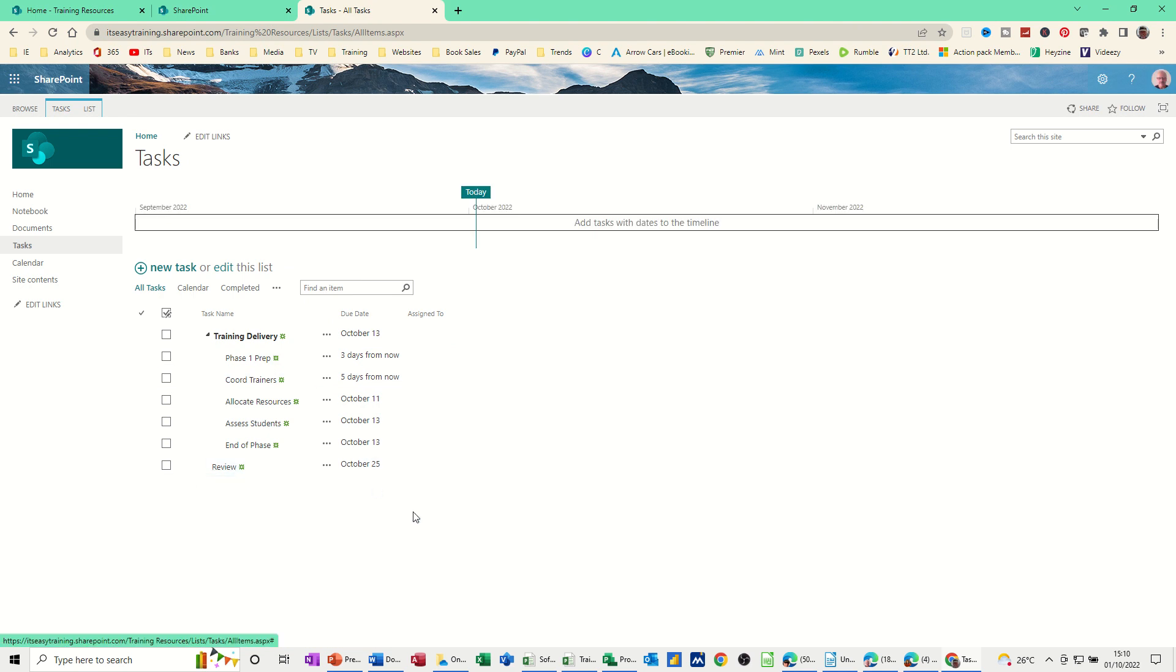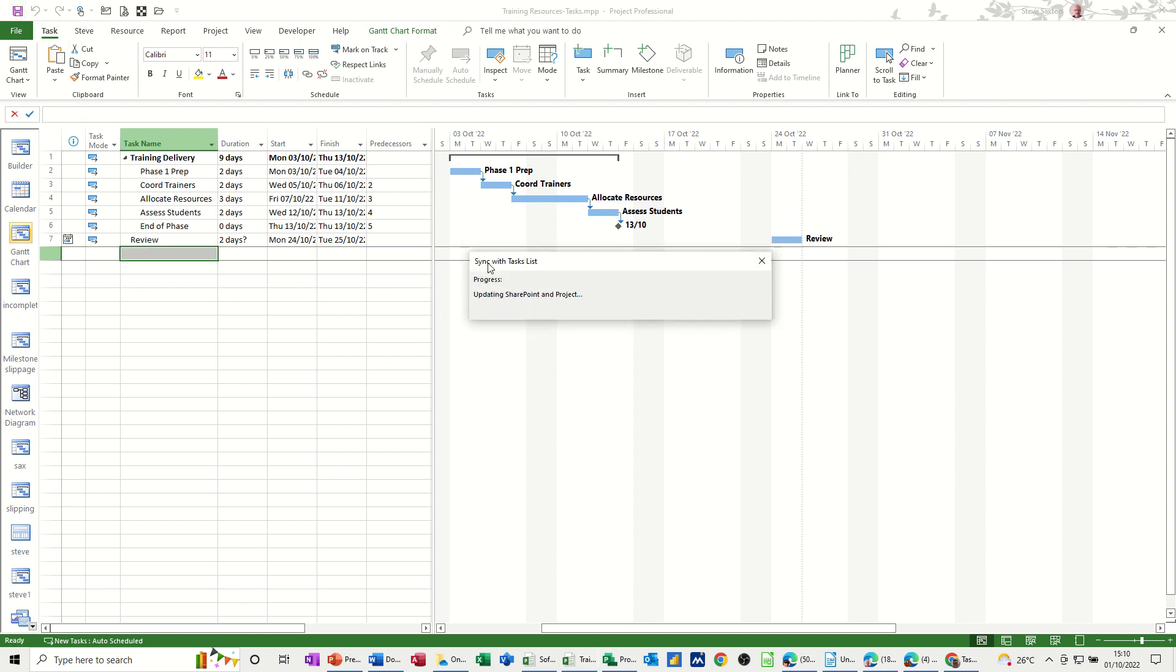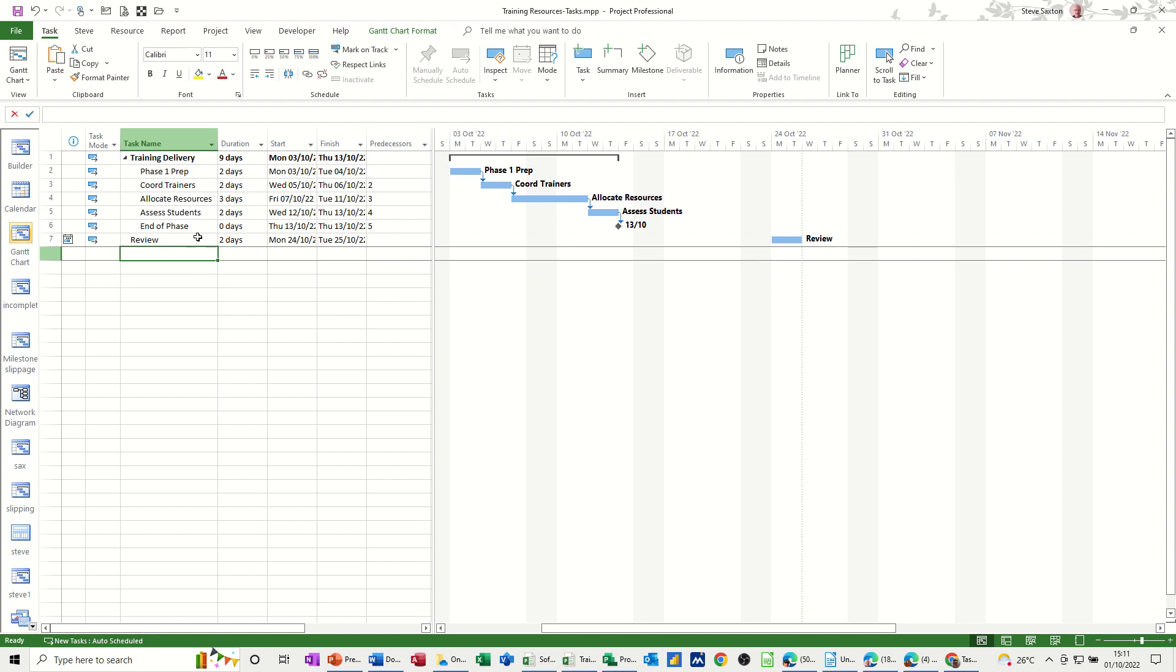But when I go back into Project that is not sitting there at the moment. If I click on Save in Project that's now syncing and it automatically brings it in. And then you've got it there with a two day duration. I can put two days in.